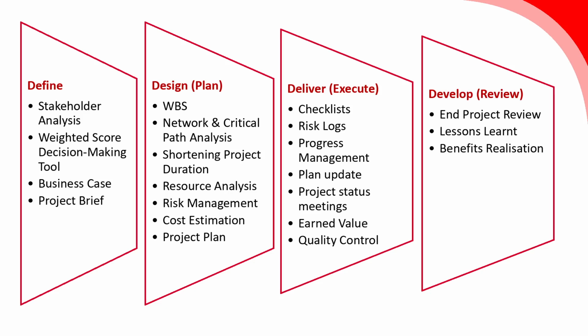So if we take, again, building a new construction, the define stage is where we talk to stakeholders, we actually develop a business case to justify the project, and we develop a project brief to give us clarity on what the project is trying to achieve.